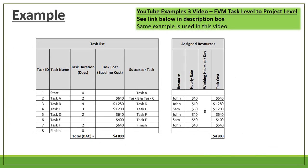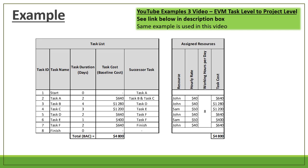The example we are using has tasks A to F with their durations and assigned resources. John is assigned to tasks A, B, D and F, and Sam is assigned to tasks C and E. For task A, the duration is 2 days and John's hourly rate is $40 per hour working 8 hours per day, so 40 × 8 × 2 = $640 for task A.